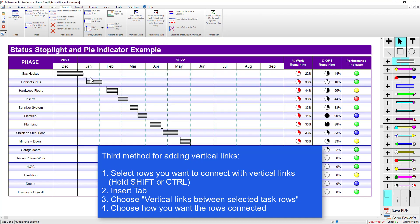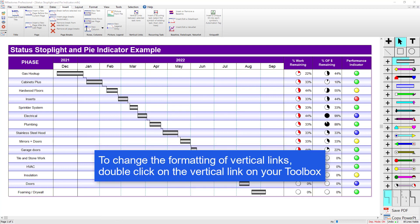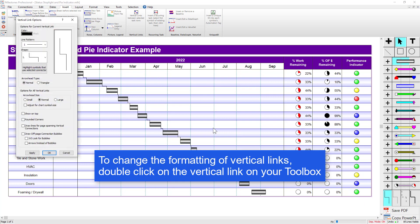You can see it added those vertical links from finish to start right there — looks pretty good. If you want to change the formatting of the vertical link, you can double-click on that vertical link in the toolbox. This is the vertical link we had selected, so I'm going to double-click on that, and you can see you can change a lot of options here.